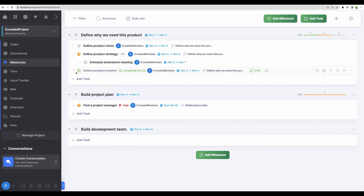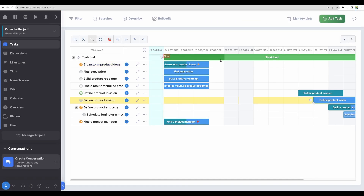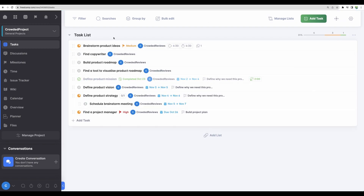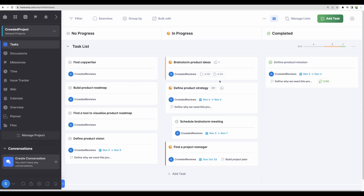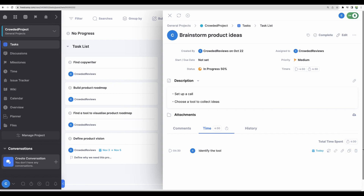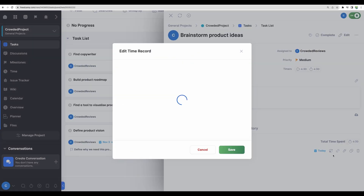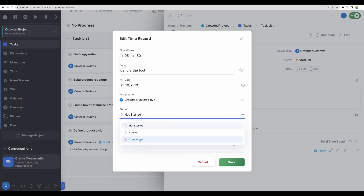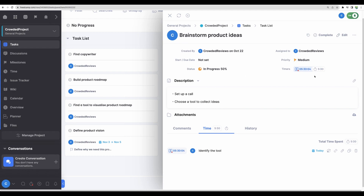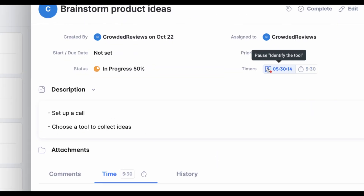Now let's deep dive into other features — for example, tasks. Here we can have all the same options: list, Kanban, table, Gantt. But this is specifically for all of your tasks from all of your milestones. We can see tasks in Kanban representation and move them around. We can go and edit a specific task, modify description, add comments, and tag users. Another interesting and important feature is adding time — here we can add time already spent on the task, like 5 hours 30 minutes, set status to completed, and save. If the status is not started, we can also run a live timer from here, and it will track the actual time spent. When you pause your work or the task is finished, you can just press pause.